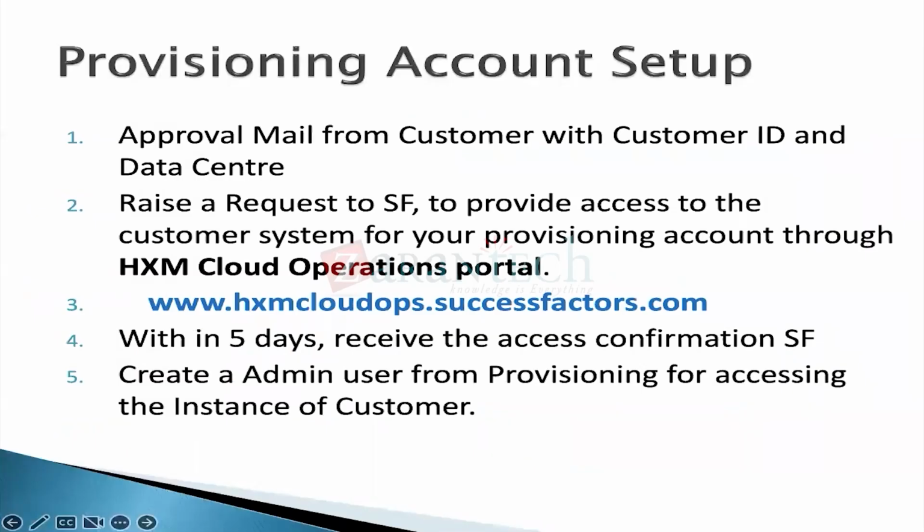First, take an approval email from the business, that is the client side, and that itself will sometimes take time. For example, you are allocated to the project, and suddenly you want to find the client-side project manager, that's not that easy. If you write an email saying please approve, why will he approve? He doesn't know who you are. Who is Shiva of IBM? He doesn't know. So first, a client introduction meeting has to happen.